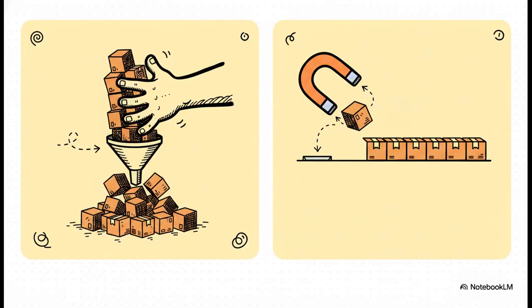Now, let's talk about how this logic flips our scheduling on its head, because this is huge. A massive part of cutting waste is completely ditching traditional push scheduling. Push scheduling relies on theoretical forecasts, basically just shoving work downstream whether the next team is ready for it or not. And what happens? You get excess inventory, huge bottlenecks, and super stressed teams.